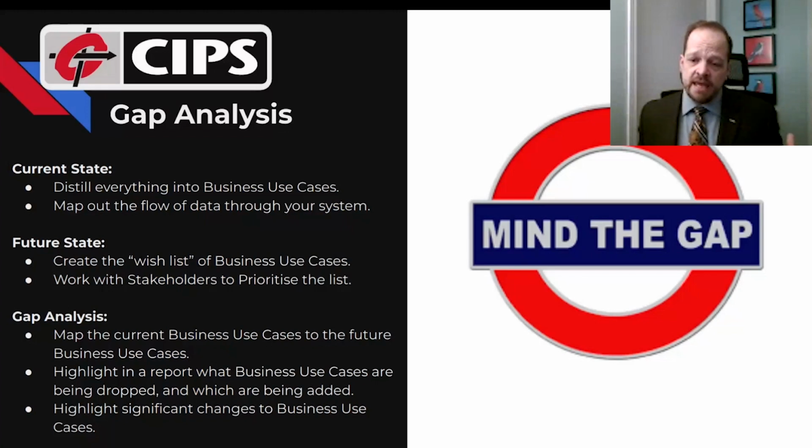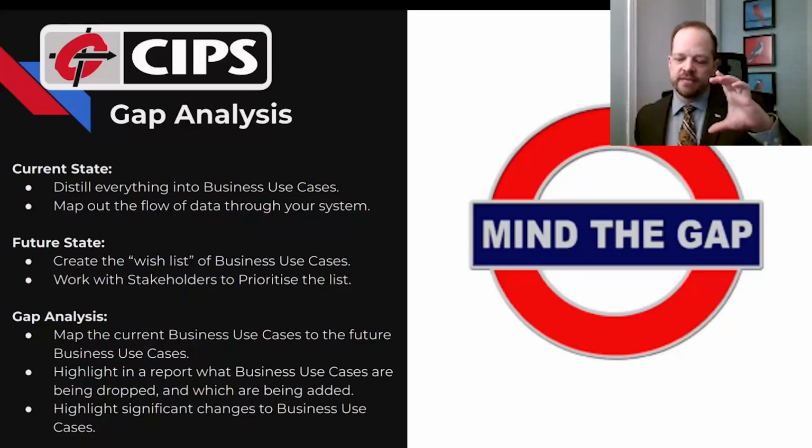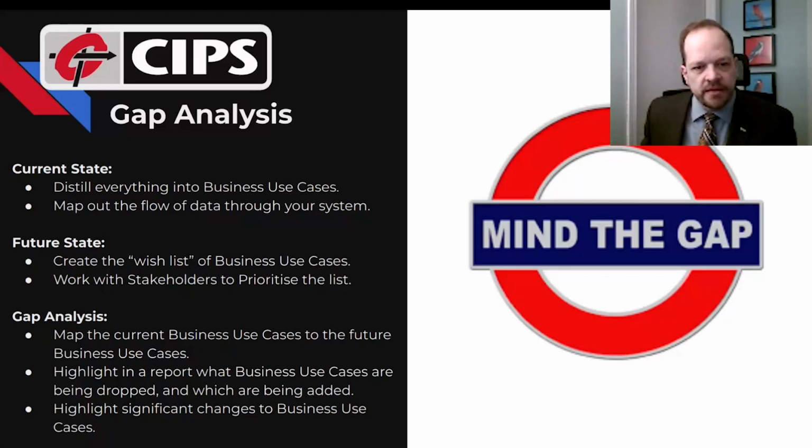If you're going to be doing a RFP for a brand new system, so you're planning to not build a BI system within your own organization, just have it maintained by a BI team that you're going to create, and you're going to have a consultant come in, or Microsoft, Oracle, Amazon come in and create your system, your gap analysis is going to be the criteria that have to be fulfilled by your RFP.